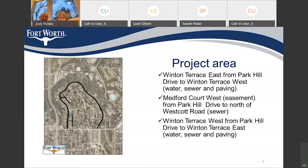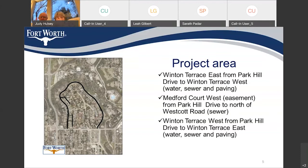The project area includes Wynton Terrace East from Park Hill Drive to Wynton Terrace West — water, sewer, and paving. There's an easement between Medford Court West and Wynton Terrace West with two easements that will have sewer work done from Park Hill Drive north to Westcott Road and north of Westcott Road. Wynton Terrace West from Park Hill Drive to Wynton Terrace East will also see water, sewer, and paving. Sewer lines will be rehabilitated in easements between Wynton Terrace West and Medford Court West.